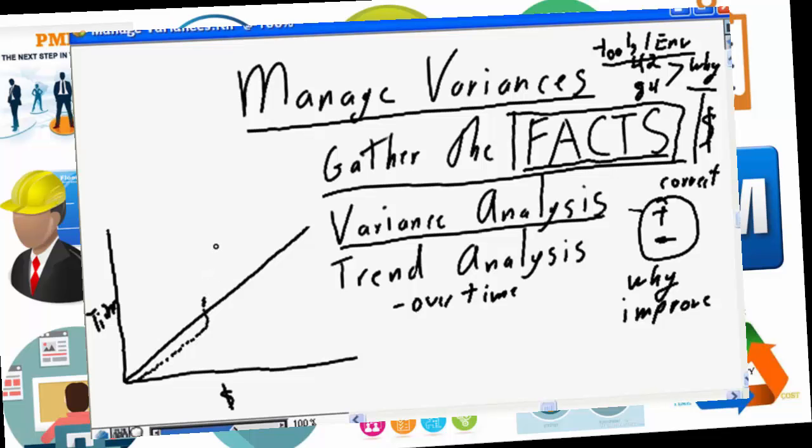If it continues in an upward direction like that, absolutely the project is in trouble and we need to take actions. But let's say that it trends upwards and then it flattens out, and again it's going absolutely parallel to our project baseline. What this is telling us is at the beginning of the project we were in very much the minus situation. We were delivering our project under budget. It may mean we didn't have our full complement of team members as per the plan. It may mean we didn't bring in the supplies and materials quite as early as expected.